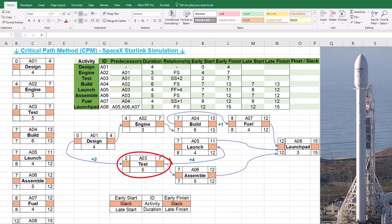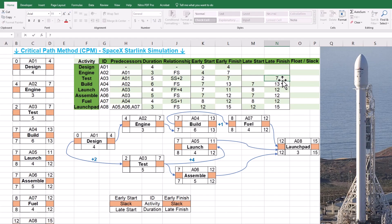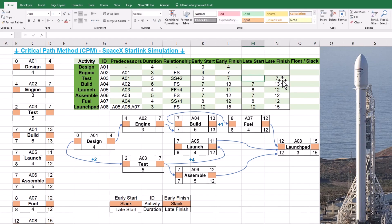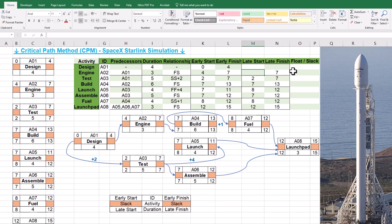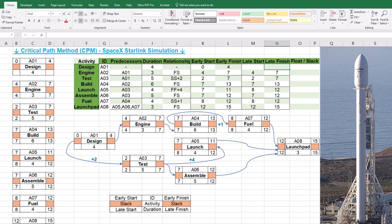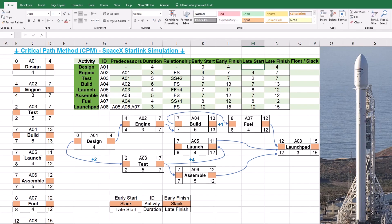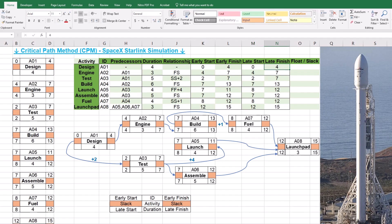A3 has two connections with A5 and A6. Its late finish can be either 8, which is defined by A5, or 7, which is defined by A6. In the backward path, we select the sooner date of 7. Considering the duration of 5, A3's late start will be 2. A2 has a late finish of 7 and a late start of 4. Late finish of A1 is determined by A2 and will be 4. Late start of A1 will be determined by A3 and considering the lag of 2, the late start for A1 and the project is 0. Please pause the video for a moment and control calculations one more time.